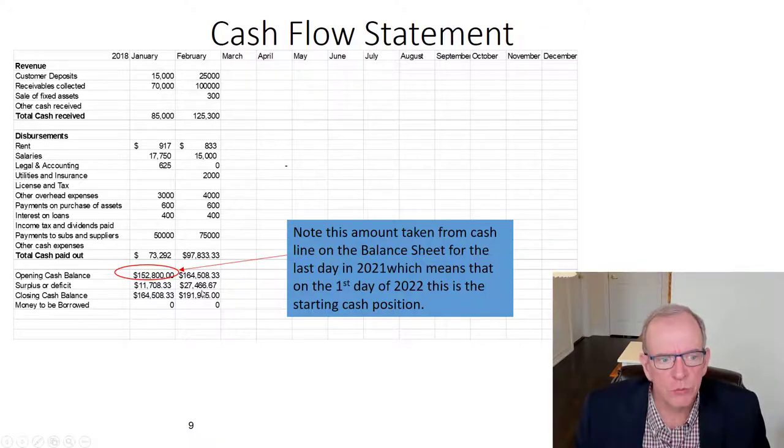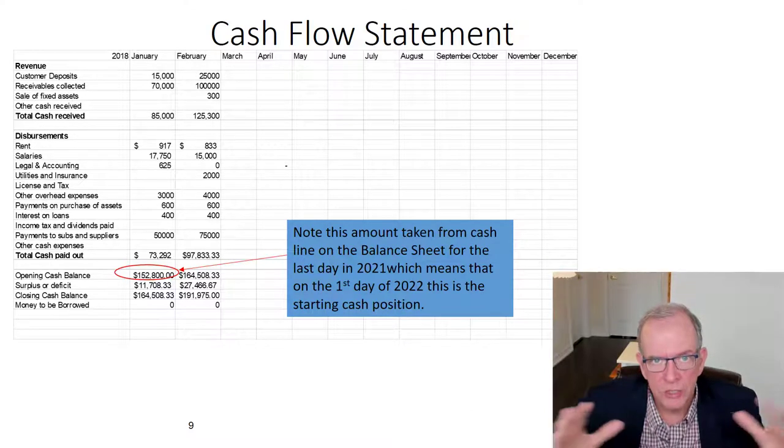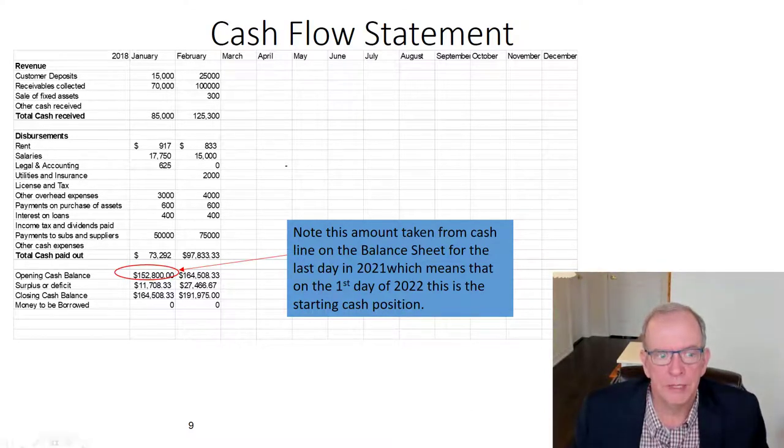For example, if this was going negative in August, you could make sure that you have a line of credit that would more than cover that amount. And I say more than cover that amount because you better leave yourself a buffer. You don't want to go down to your last penny, and then if somebody delays paying you, the house of cards falls down. You definitely want to have a large contingency buffer in those cases. But you're effectively managing that ahead of time.